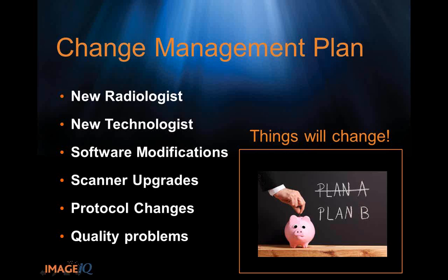But what elements need to be in that? A really good example that comes to mind is several years ago, when I was back in clinical care, we had a big radiopharmaceutical issue. Every week we'd get messages about whether we were going to be able to get technetium or not. So if you've got a nuclear-based trial and you're drug dependent, what happens if you can't get that drug? Certainly we would have never thought about that proactively, but if it came up and it's at one of your time points, it could be critical.